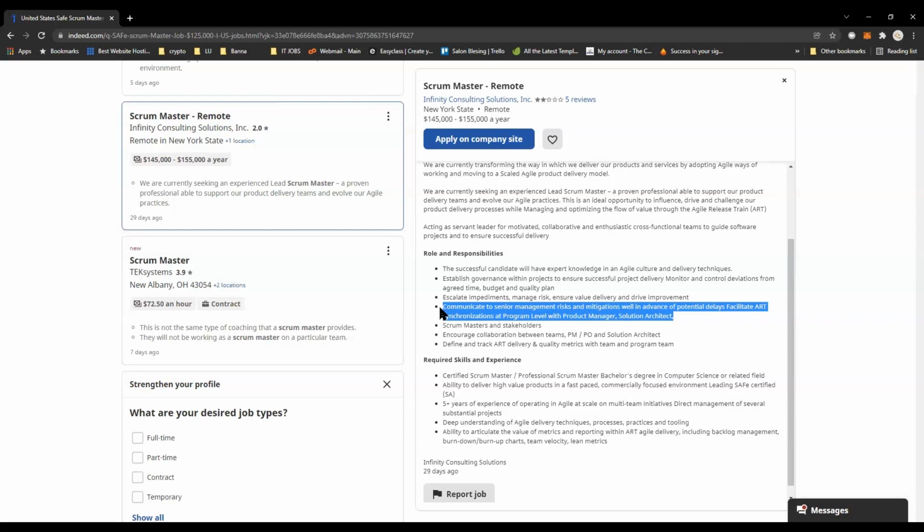He got a new job and we are still doing the backfilling. So our velocity is going to be impacted and the work we committed to, we won't be able to deliver. They want you to flag that on time so they can anticipate and communicate to the clients that this is what we wanted to do, but we couldn't because of some issue. Does that make sense?